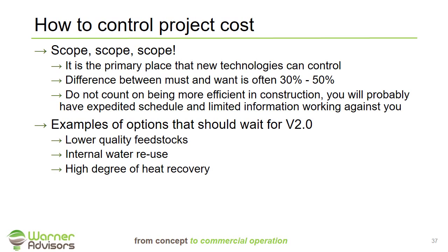And finally, a high degree of heat recovery. Obviously, being in the industry of advanced biotech, we want to be as energy efficient as we can. Trying to integrate a high level of heat recovery in a process can actually cost a lot of capital, and it can also give a degree of complexity that can make a project hard to start up.